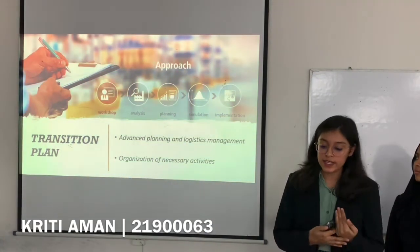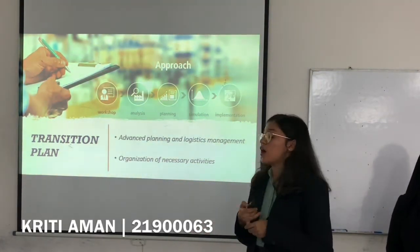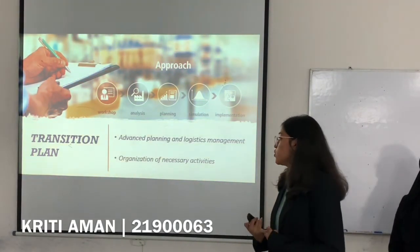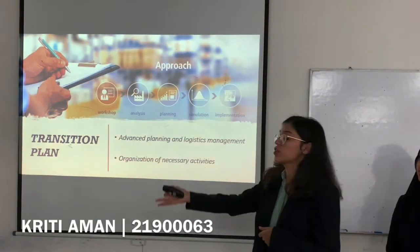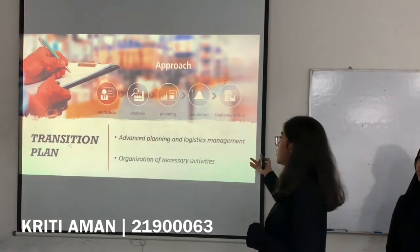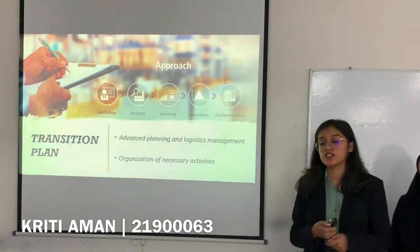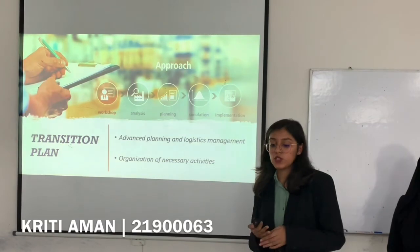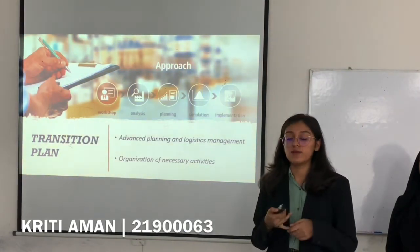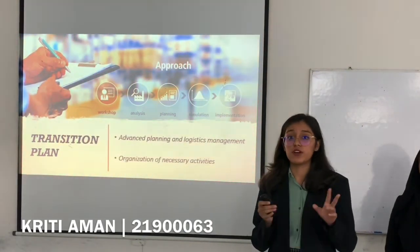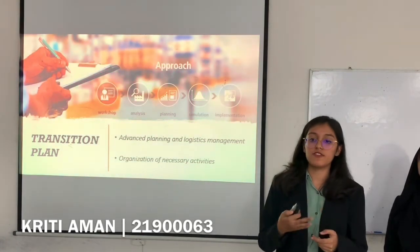Now that we are done with planning and updating the procedures, we move on to the transition plan, which is the last component of our ORAT sequencing program. The transition plan involves advanced planning and logistic management, approached through a series of stages: workshop, analysis, planning, simulation, and implementation, leading to transition. According to ORAT, it is necessary that move activities — such as taking equipment from one place to another — should occur before or after the airport opening date so that problems that can occur in the early phase can be reduced.